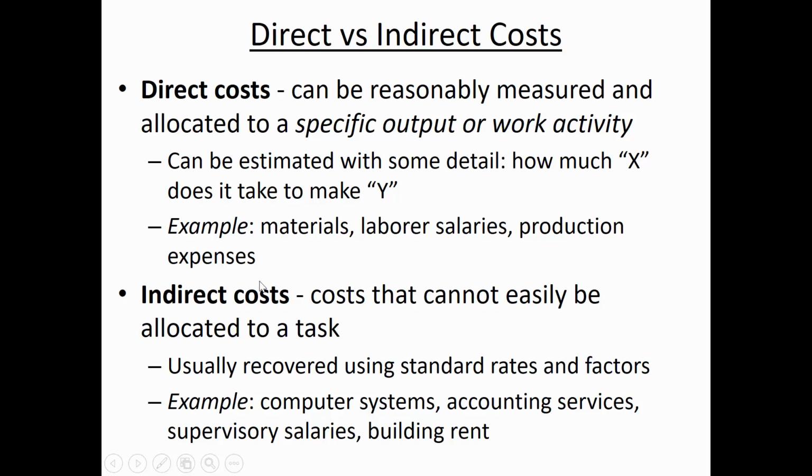And then rather than itemizing the rest, you just apply a percentage factor for the indirect costs. So that's what we'll do in the coming in-class exercises, is we'll itemize the direct costs and then just kind of lump an additional percentage on top of them to cover the expenses that are associated with indirect costs.